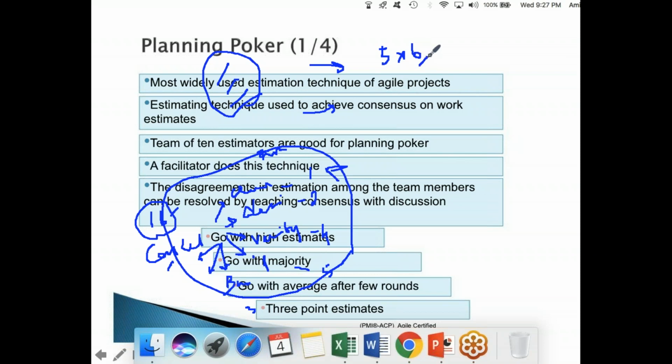Even clerical activities you have to remove. Daily meetings, non-technical work, clerical work, what we do. Let us say on average 6 hours, and you are getting 5 members. So total 30 hours per week. So how many weeks is this sprint? 2 weeks. So 30 into 2 weeks, 60 hours as a team we can work on it.